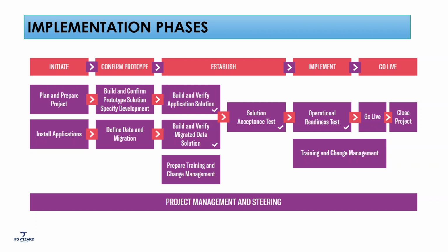After the go live phase, we do a handover solution to the client. As a consultant, once the implementation is over, or after the go live, we hand over all documents. We hand over the book of rules, the complete book of rules. Then if we developed any CRs, all the specs, and if there are any changes to business processes, we are going to deliver all that after the go live. That's the handover to the client. That's pretty much what we can do during these phases.